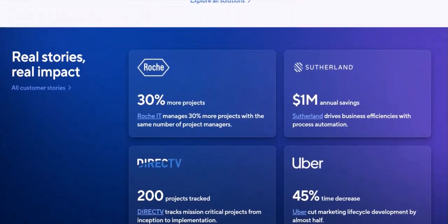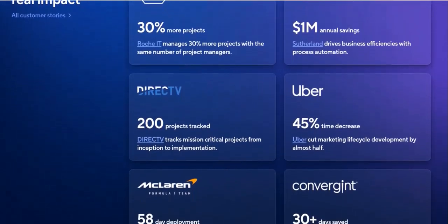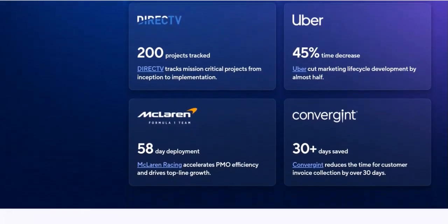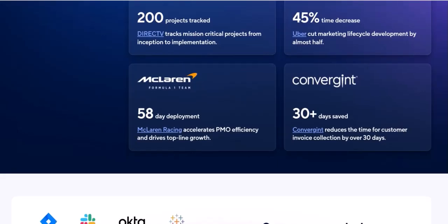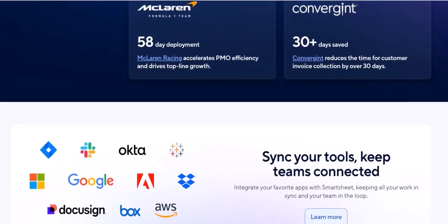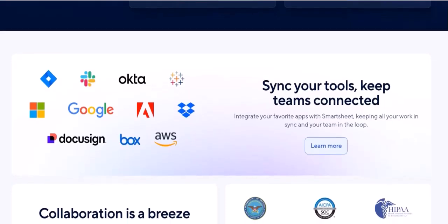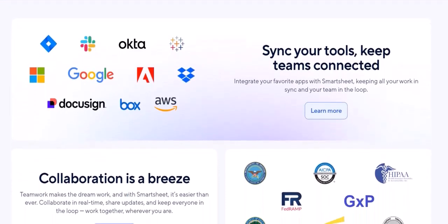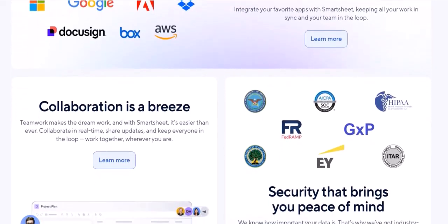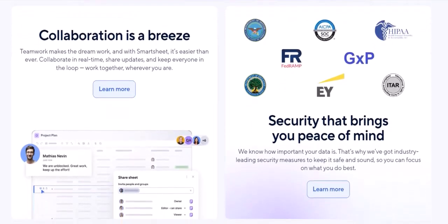Now, David, even without a Smartsheet license of his own, can access the shared sheet via a link Sarah sends him. He can see all the tasks but can only directly edit the rows where his name appears in the assigned to column. He can update the status, e.g., in progress, completed, add comments, and attach his design files directly to those rows. This scenario perfectly illustrates how collaboration works in Smartsheet without requiring every contributor to hold a paid license. It streamlines the workflow, ensures everyone can contribute their updates, and keeps the project information centralized and accessible.